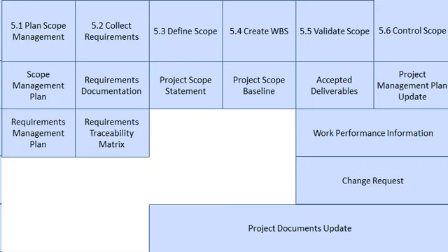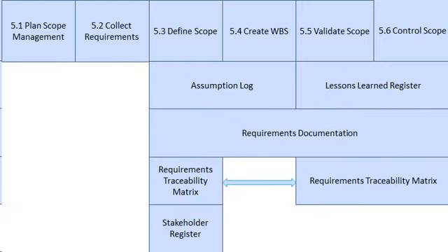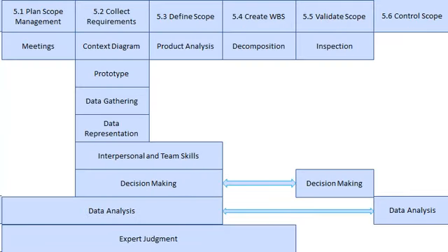The scope can be defined using the question, what needs to be delivered? The scope can also mean what is included and not included in the project, may it be deliverables or activities. Project scope and product scope are the 2 other forms of scope. The project scope includes all of the activities and deliverables, since it considers the talents required, the procedures followed, the tasks completed, and the templates utilized, all of which contribute to the deliverables.